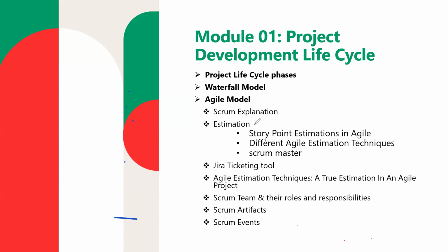I have seen many people confused about story points and number of mandays. Story points and number of mandays are completely different things. Story point tells about the complexity of the task. It doesn't tell about the manday. There might be the same task where, for one story point, one developer will take 1 day and another developer will take 3 days. An experienced developer can do a one story point task in 1 day. A junior developer might need 3 mandays to complete one story task.